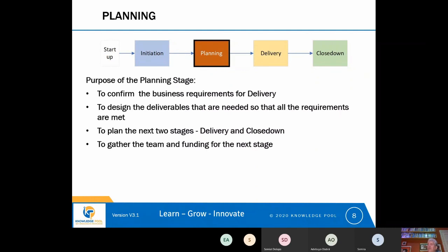And the project might decide, as a result of identifying that risk during initiation, to do a bit more work in planning, and it might decide to try and gather some more requirements. It might try and go to a slightly lower level of detail, or it might try and make sure that it's gathered at least one requirement under every sort of category of heading.